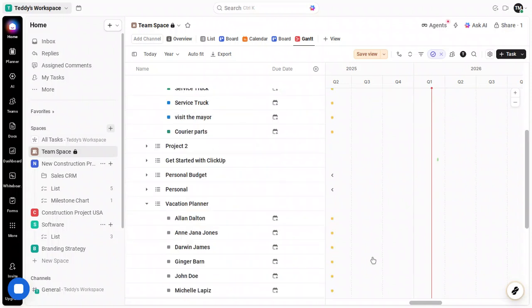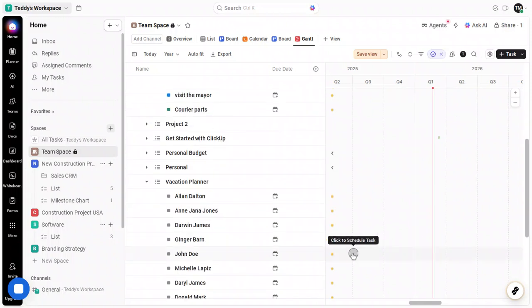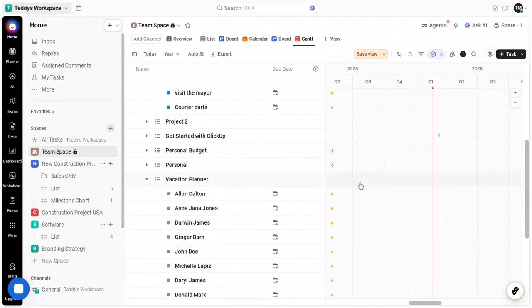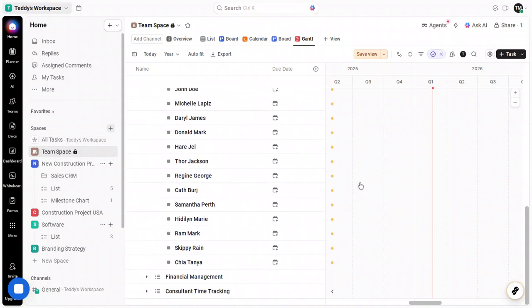As you work, a few habits will help keep your Gantt chart useful. Keep durations honest. Pad for review time, if that's part of your process, and adjust when scopes change. Use colors intentionally, not just because they look nice. Color should communicate. And when possible, make updates in one place, the Gantt view, so your schedule, statuses, and dates stay synchronized.